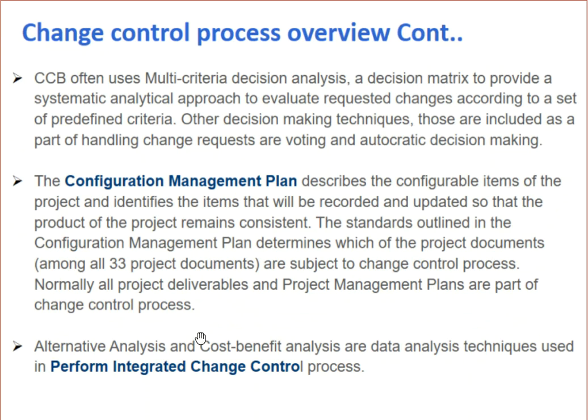CCB often uses multi-criteria decision analysis, a decision matrix, to provide a systematic analytical approach to evaluate requested changes according to a set of predefined criteria. Other decision-making techniques included as a part of handling change requests are voting and autocratic decision making.